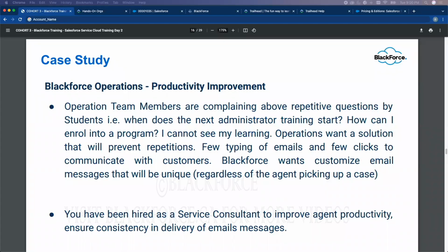You could also go to SIT before UAT. SIT is system integration testing, whereby you load data into the system and you test for performance. Then you go to UAT. UAT is where the user is testing. You don't touch anything in UAT because everything in UAT is like literally telling the user, this is production. Tell me that you love everything here. If you love everything here, we're moving this to production. However, if you don't love it right now, tell us, okay? That's where you do your testing.